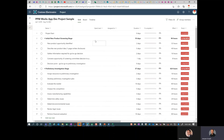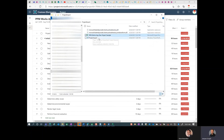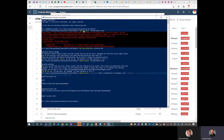Let's recap what we did: we unpacked the downloaded file, went into PowerShell, and ran some commands. The commands were Import-Module, then if needed Set-ExecutionPolicy Unrestricted to get through security, and then the Import-Project command with your instance ID and the sample MPP file path. As of late April 2021, this is how you import an MPP file into Project for the Web.